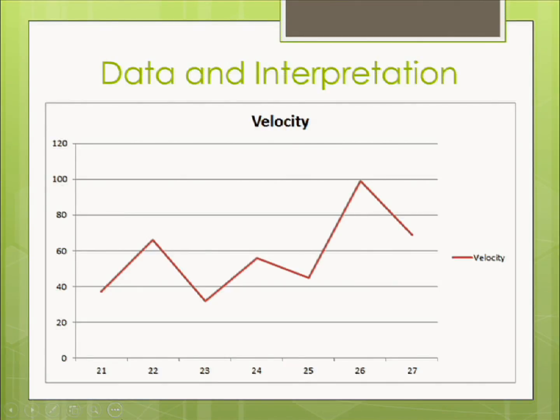Because you don't know in the low points, maybe there were people on vacation, and in the high points, you might have had a whole bunch of work carry over from the last iteration that just got all checked in and tested in this one iteration. There are so many variables here. But if you post this, everyone is going to interpret it, and they may interpret it different ways. Your teammates are going to interpret it. Management's going to interpret it. Other teams are going to interpret it. But there's no interpretation here, so there's no value here, because it's just going to send the wrong message.